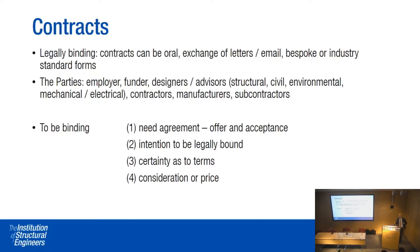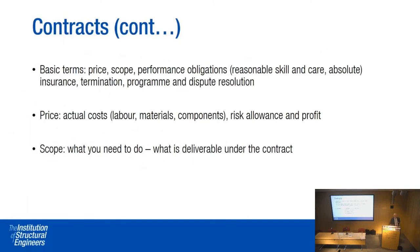Not all agreements create a contract — if I arrange to see my daughter for lunch on Friday, we may enter into agreement but not necessarily a contract. There has to be an intention to be legally bound; the courts recognise social situations where that intention is absent. There has to be certainty as to terms — certainty around the fee, the price, what has to be delivered. If you don't have certainty of terms, the contract could be null and void. And all contracts must have a consideration or price, which typically in our case would be a fee.